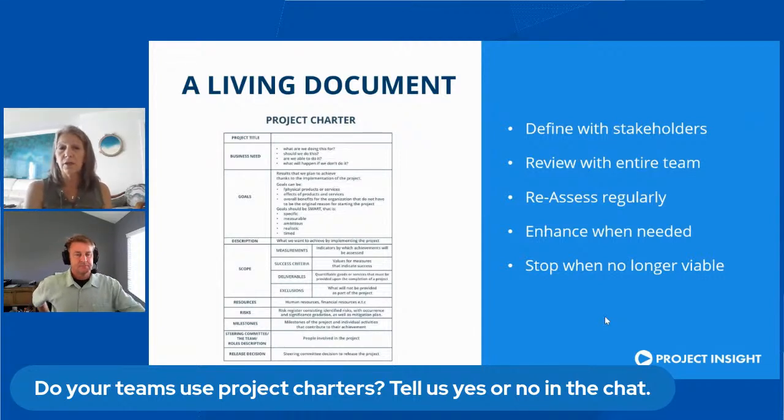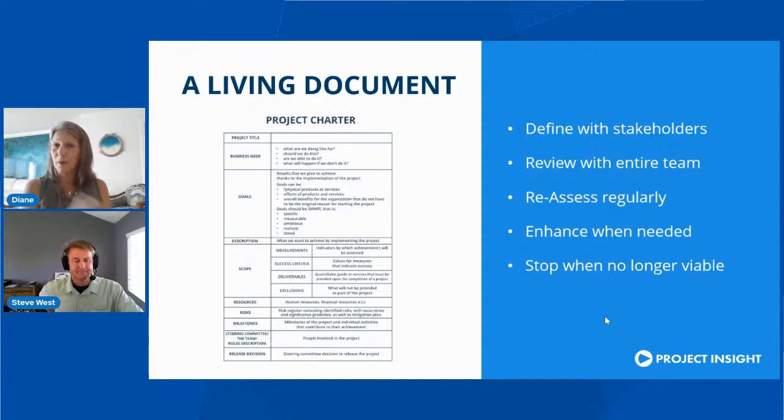The answer to that is yes, you should always have some level of charter. And the main reason why is because every single project, what do you think the one thing that always changes on a project? The scope. The people. Yeah, the people. If you have the same people time after time doing the exact same thing, that's more like operations. So every single project's going to have different people and different stakeholders. So it's really important to take the time to spell out a charter.